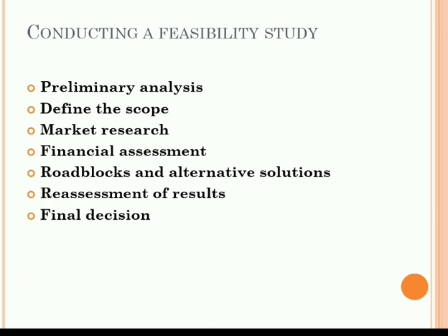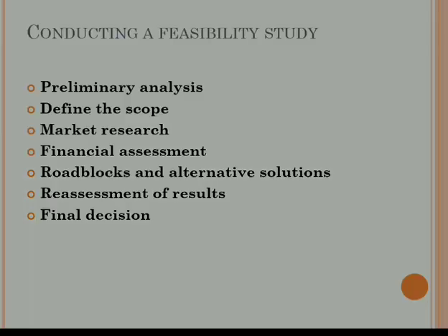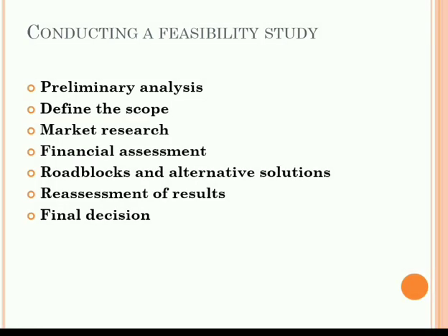for the problems. So in this stage, we have to re-examine previous steps, such as income statements, and compare them with the expenses and liabilities, and check whether it is realistic or not. This is also the time to think about risk analysis and management, and we have to come up with contingency plans also. The last step is final decisions.